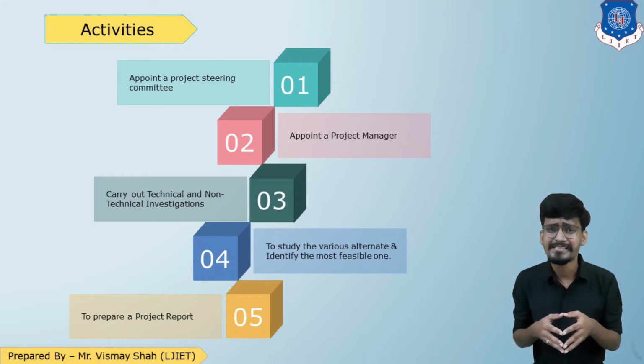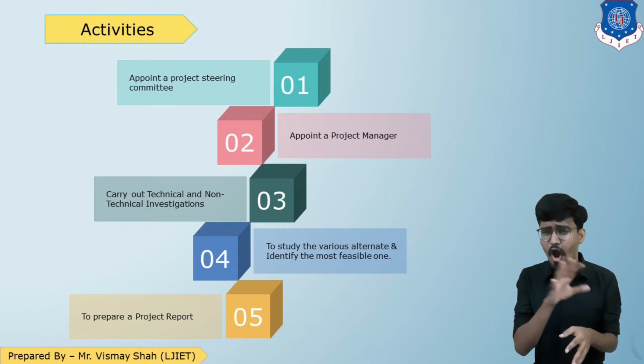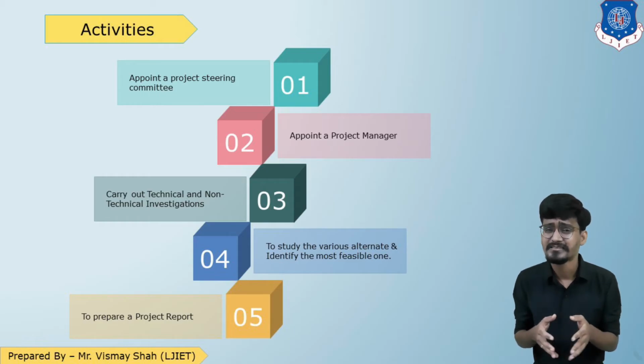Next, to investigate technical and non-technical aspects of the project. Then to study the various projects and to identify the most feasible one. And the last is to prepare a project report. So these are the activities involved in the briefing stage: appoint a project steering committee, then appoint a project manager, technical and non-technical investigation, list out all the alternatives and try to analyze the most feasible one, and then prepare a project report. So all the things are covered in the briefing stage.